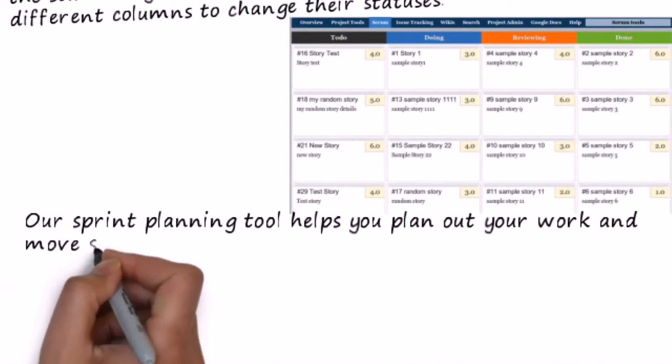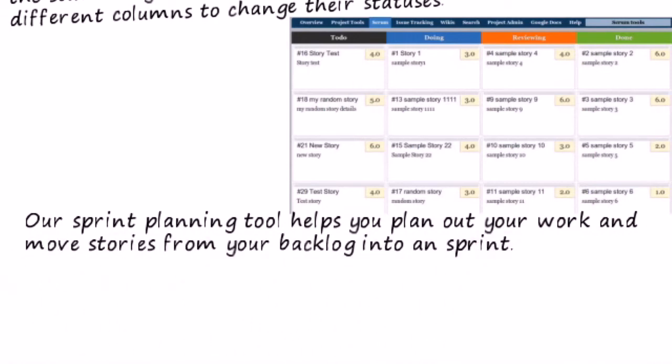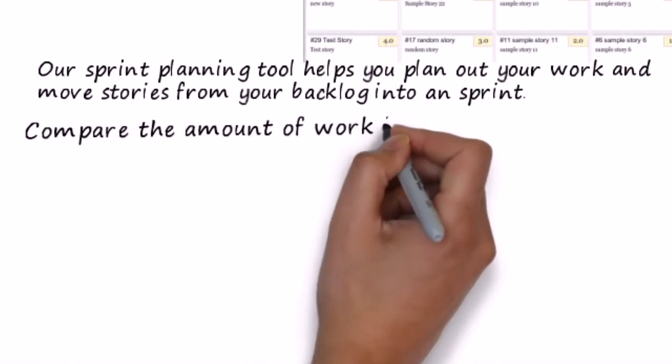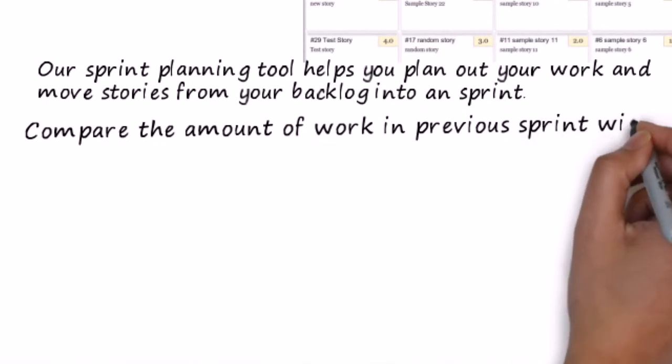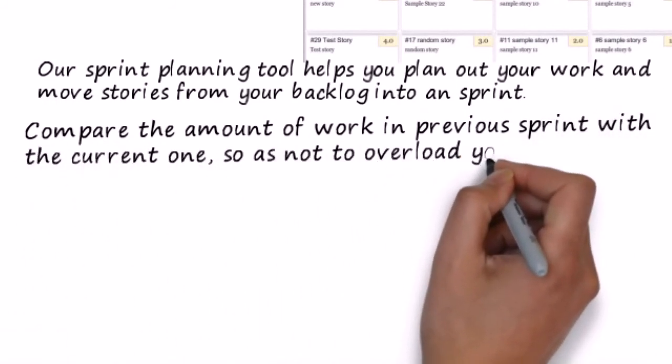Our sprint planning tool helps you plan out your work and move stories from your backlog into a sprint. Compare the amount of work in previous sprints with the current one so as not to overload your team.